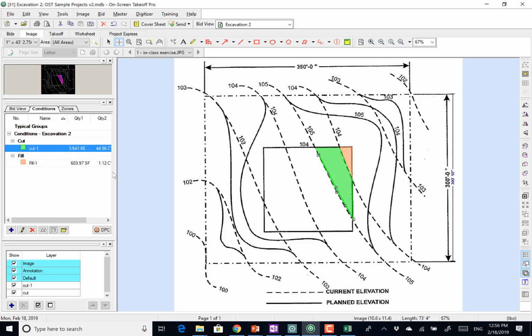How do we know how far away to haul? Submit an RFI. That's definitely one thing. Another thing that I have not received an RFI for, which is peculiar, is that do you know your soil swell and shrinkage factors? So somebody submit an RFI. Right?